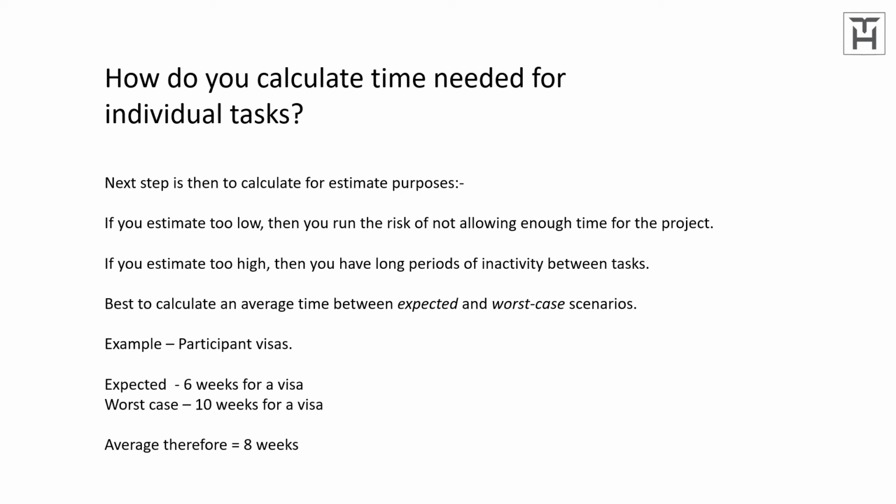Now, this is important because you're not always, as a project manager, given the opportunity to devise how long a project is from start to finish. You can calculate it, but sometimes the stakeholder wants a project done by January 5th and it's already October. So the problem with this is that you have a set amount of time to do it. But if you need to highlight and show the stakeholder why it cannot be done in the time that they decided that it should be, the critical path diagram is a good way of showing it to them.